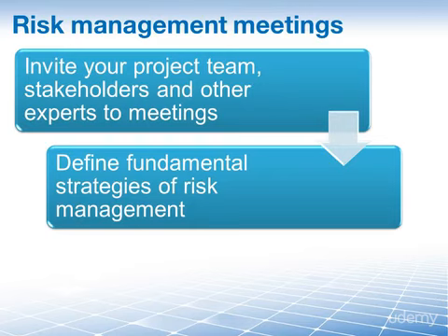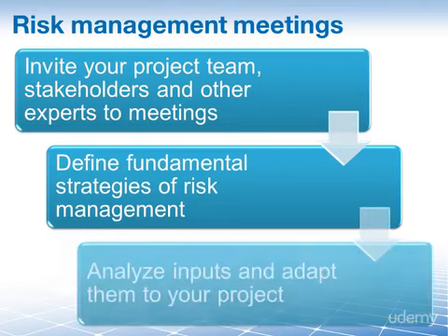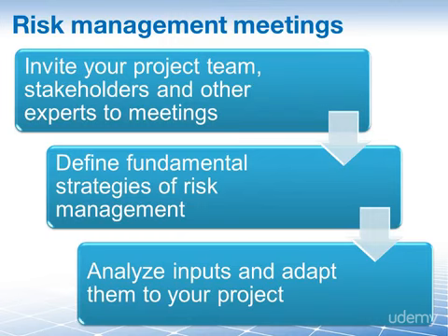You may define certain risk-related deliverables that need to be included in the work breakdown structure. This will lead you to realizing that you need activities on your schedule, and that again will lead to adding additional components into your budget, which touches cost management. Remember, all these policies and procedures and templates that we have as inputs from the organizational process assets, in your meetings you will analyze them and you will adapt them to your project. What good is a standard risk register with 2,000 listed risks if you don't review it and make sure that they actually apply on your project?